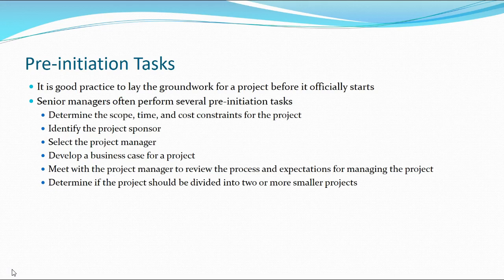So what are some of the tasks that we take on before we initiate a project? Bluntly stated, you need to think about whether or not this actually fits within your company at the 30,000-foot view. Meaning, if we look at this project from the get-go, if our company has $1 million in revenues a year, can we possibly take on a project that costs $500,000? Does it actually fit within the amount of cost we can bear? What about the time frame? If we're in a company that typically does short-term projects, do we have the resources and the wherewithal to do a multiple-year project? So is the scope and time correct for us?